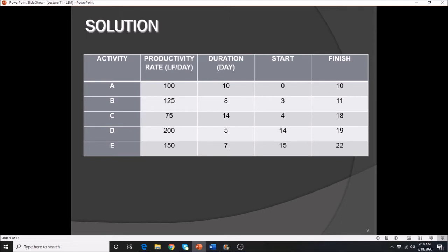And by the way, class, if you obtain decimal values, I encourage you to round up to the next whole number, because we will be paying our workers, especially if the project is far. As you bring in your resources, we will be paying them a full day. Well, it's a civil project.